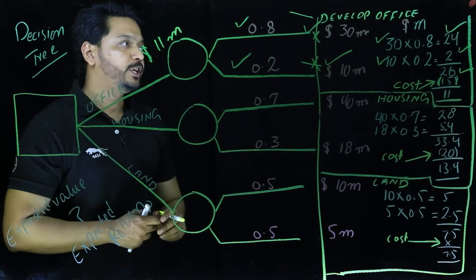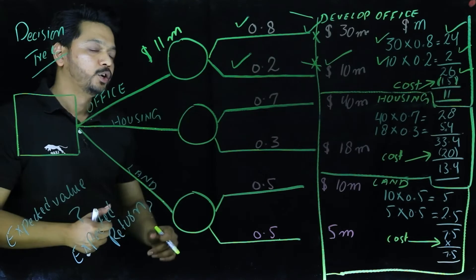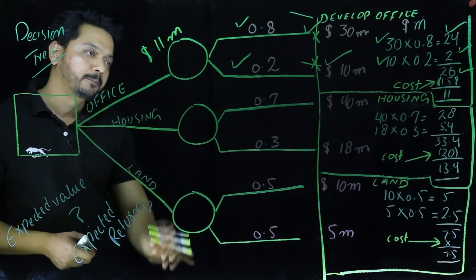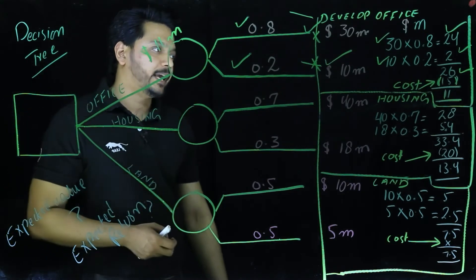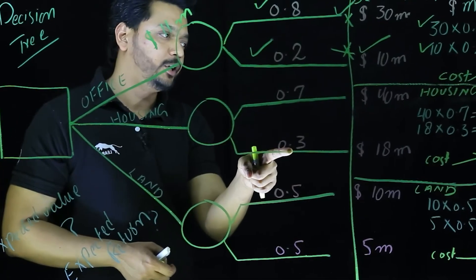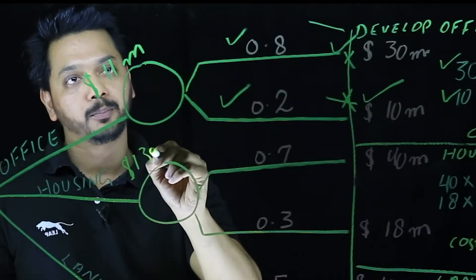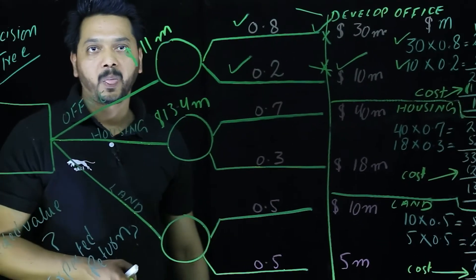Now we need to see where we stand when it comes to the other options. When it comes to the option of housing scheme, the probability of success is 70% and the probability of failure is 30% here, which will give us with the same method $13.4 million.